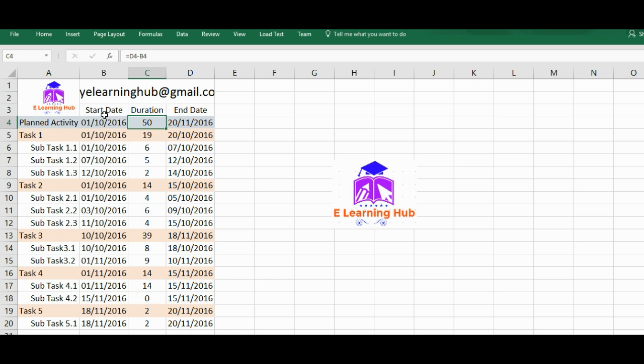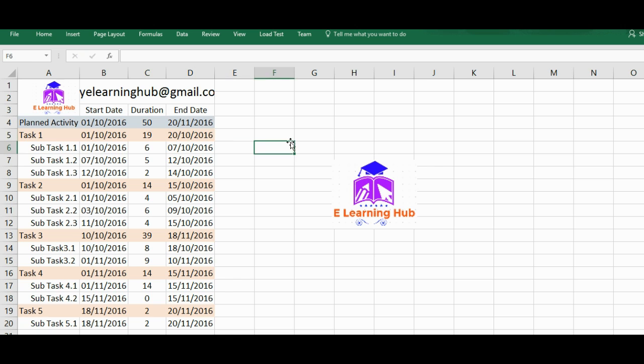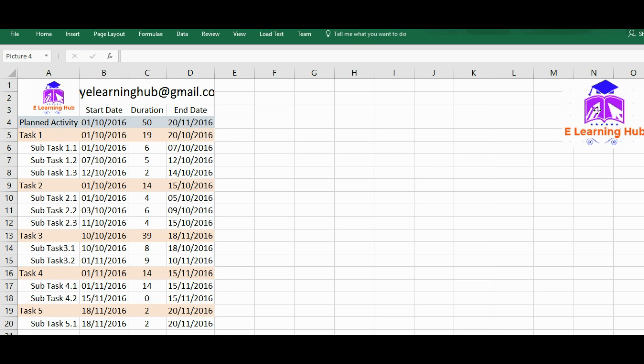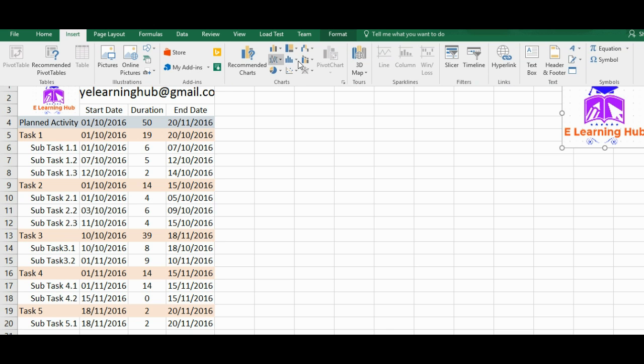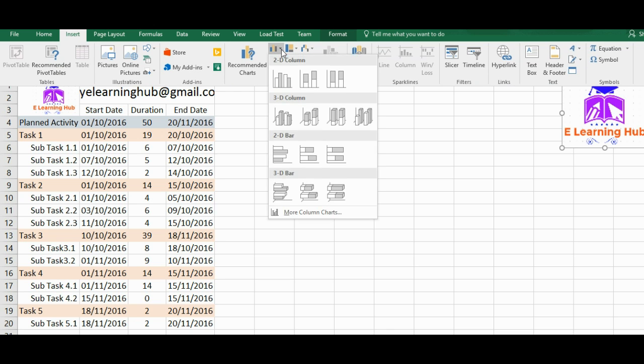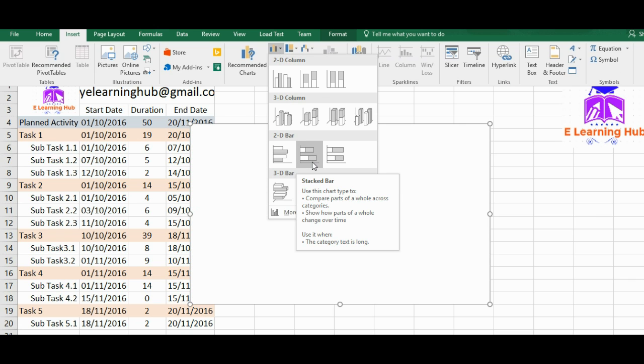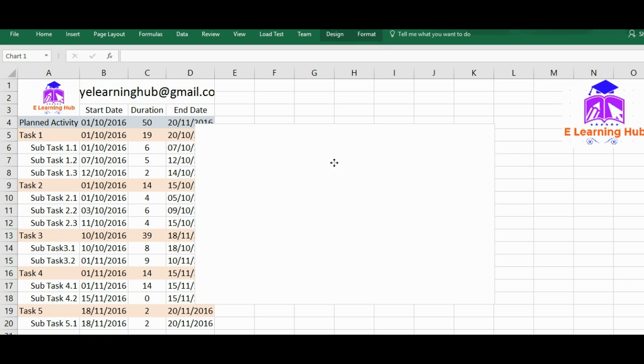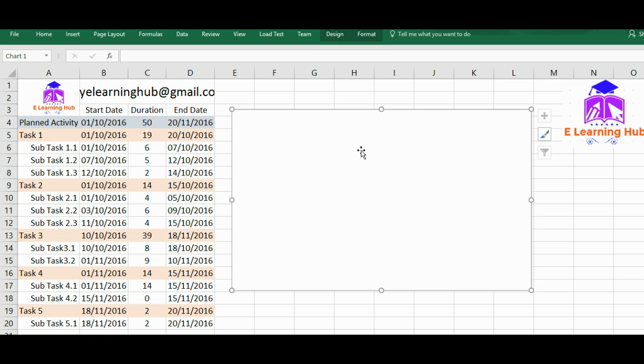You can see that column D minus column B will be getting the duration for different activities. Or if you have readily the durations available, then no issue. You don't need to write end dates. So without wasting time, I'll just draw a Gantt chart. I will not explain again, you can just go through it while I'm drawing it.